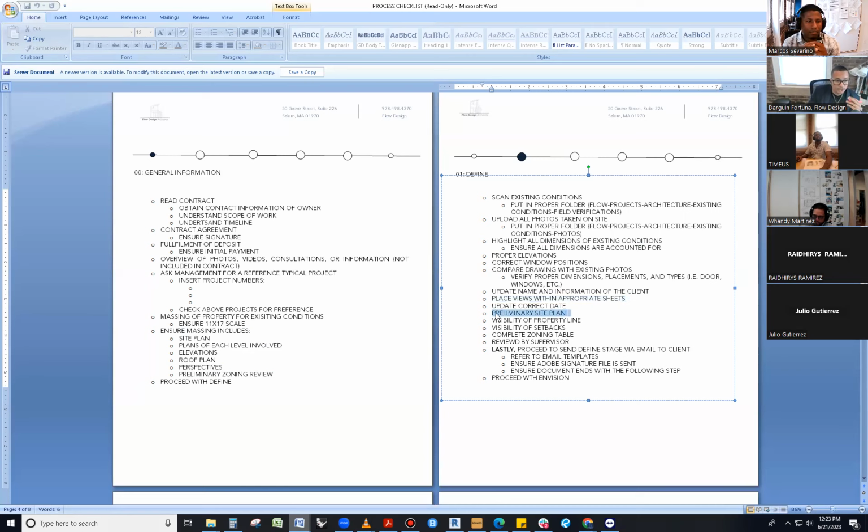Preliminary site plan, you're going to be doing that. If Patrick was hired, you can obtain information from Patrick on that. If Patrick wasn't hired, you will learn that from management. But also the contract says including survey. If it's not including survey, likely we're not doing the survey. So you are already empowered to say, hey client, we need a survey for this. So you could even ask for it because you know that these are the things that will go within that project.